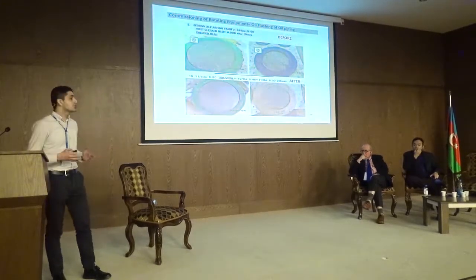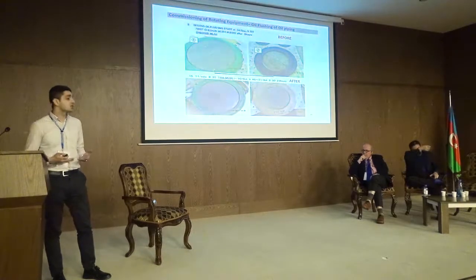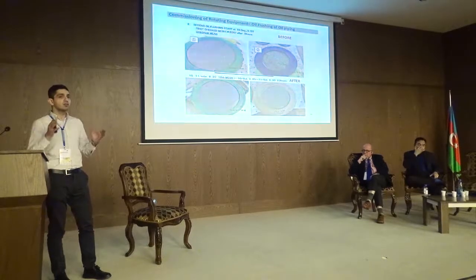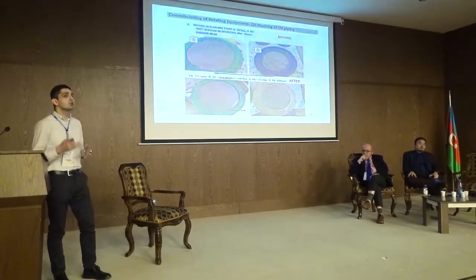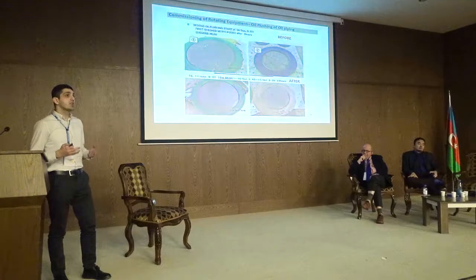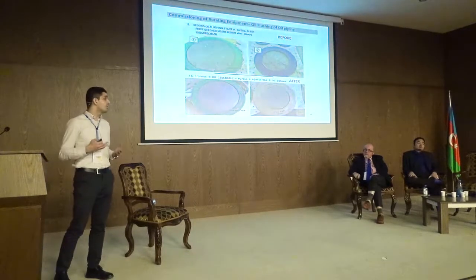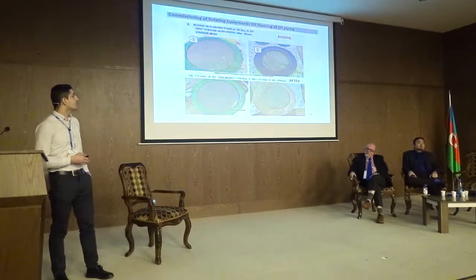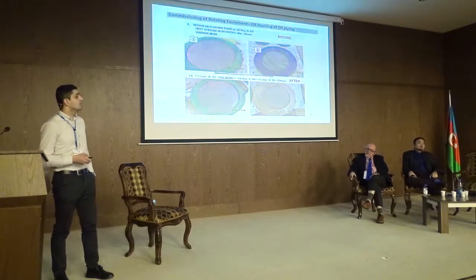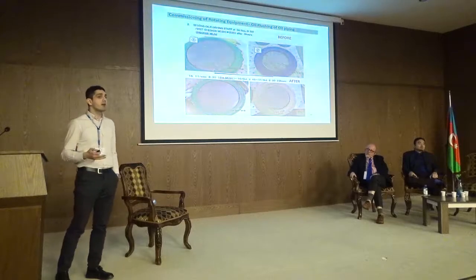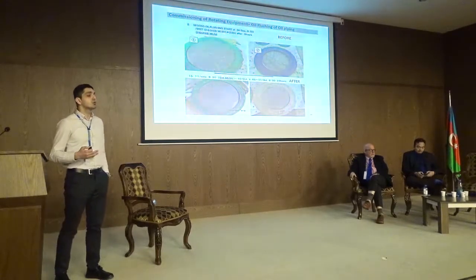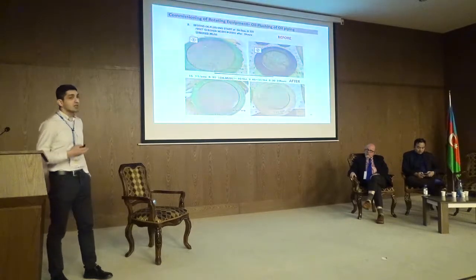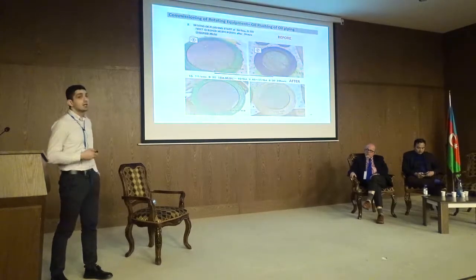So that's why we have to, first of all, clean the system, and we are using the original lube oil for the cleaning purposes. We are building a recirculation arrangement, and we are recirculating the lube oil. It could take even months, actually, in order to have proper results in the end, in order to properly clean the whole lubrication cycle. And we could also use some thermal shock effects, like increasing and decreasing temperature, or air bubbling effect, in order to facilitate the lube oil flushing and speed up the procedure.